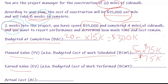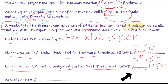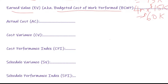Now let's look at the reality, which is earned value — how much have we actually done. This is the budgeted cost of work actually performed (BCWP). We've done four miles of sidewalk, and at $15,000 each, the four miles are worth $60,000. So we have done $60,000 worth of work, and that is considered the earned value.